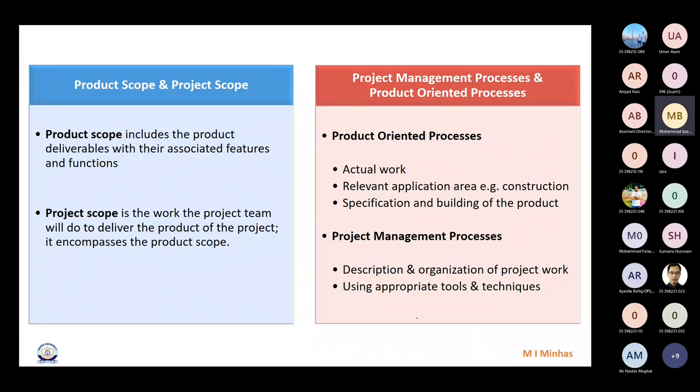Many a times we do this in order to break down the work into smaller pieces. For example, if it's a polio ka khatma scheme or project or program, and you say that it's difficult for us to manage everything in all the districts in one go, so what would we do? We might start it with a few districts or maybe one province only. And then we say, once this phase is over and we have learned many lessons, keeping those lessons in mind, we are going to start or plan our next phase. Obviously, you would require a separate initiation, correct?